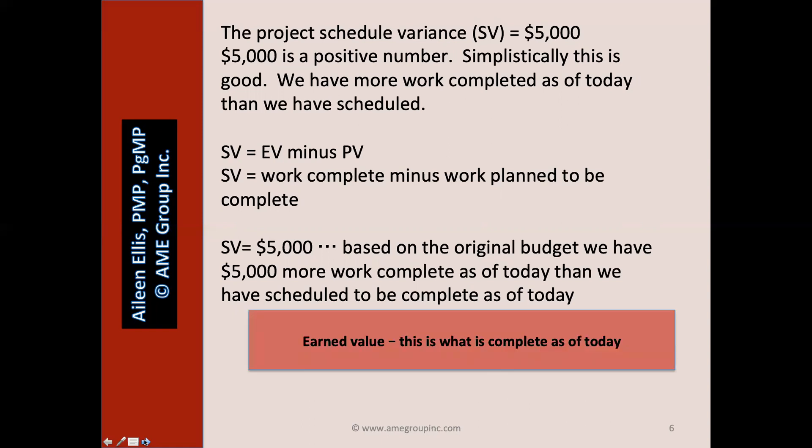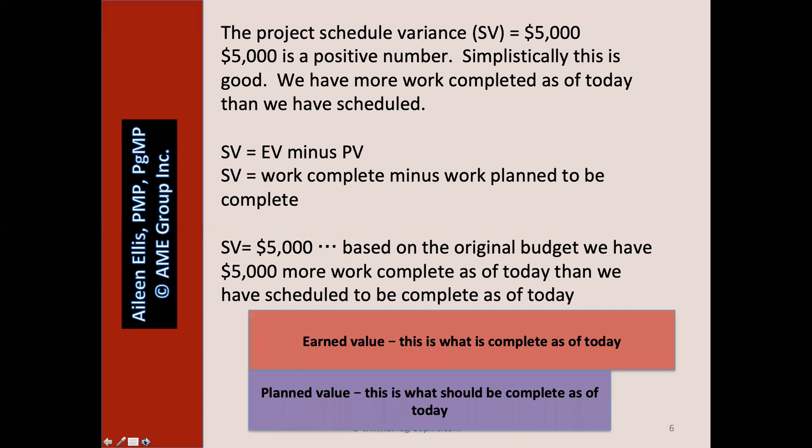Earned value is what is complete as of today. Planned value is what should be complete. You can see our earned value is larger than our planned value — we are ahead of schedule.